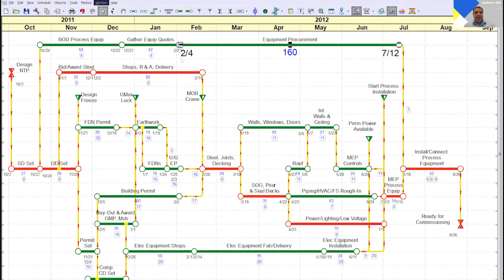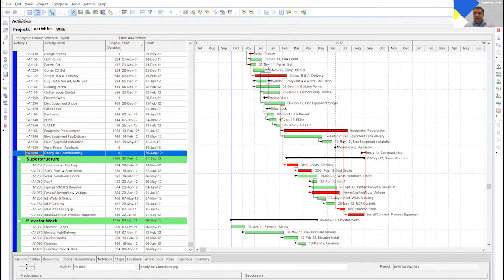So at this point, if we look at the P6 schedule, we have the two fragments that I brought in from two different NetPoint schedules into one single P6 project. Like Tim was mentioning earlier, you can have different sessions with different trades and merge that in at a later point into a P6 schedule. So you don't have to build the entire detailed activity schedule in P6; you can build pieces of it in NetPoint and then add it to your main schedule over here.